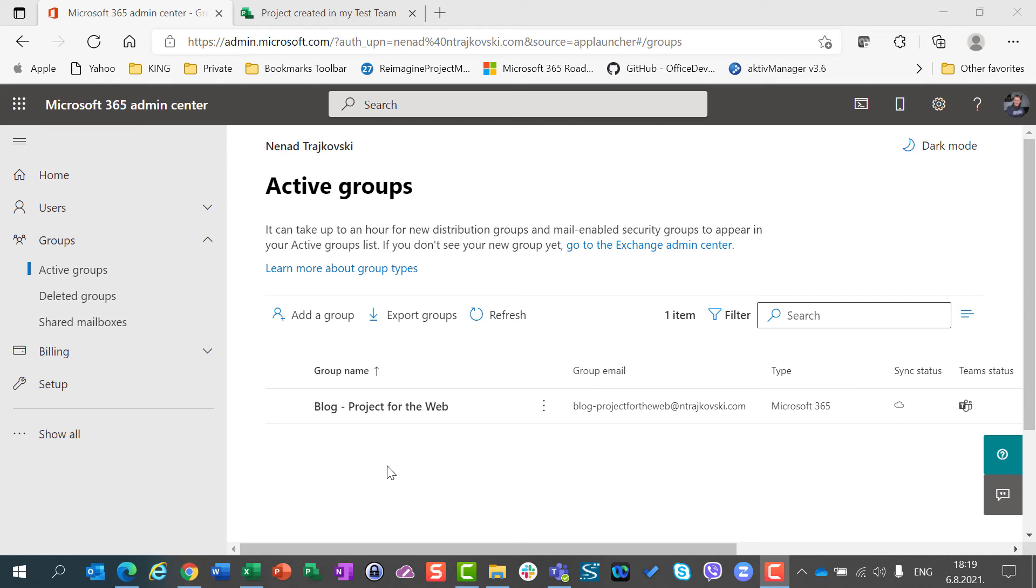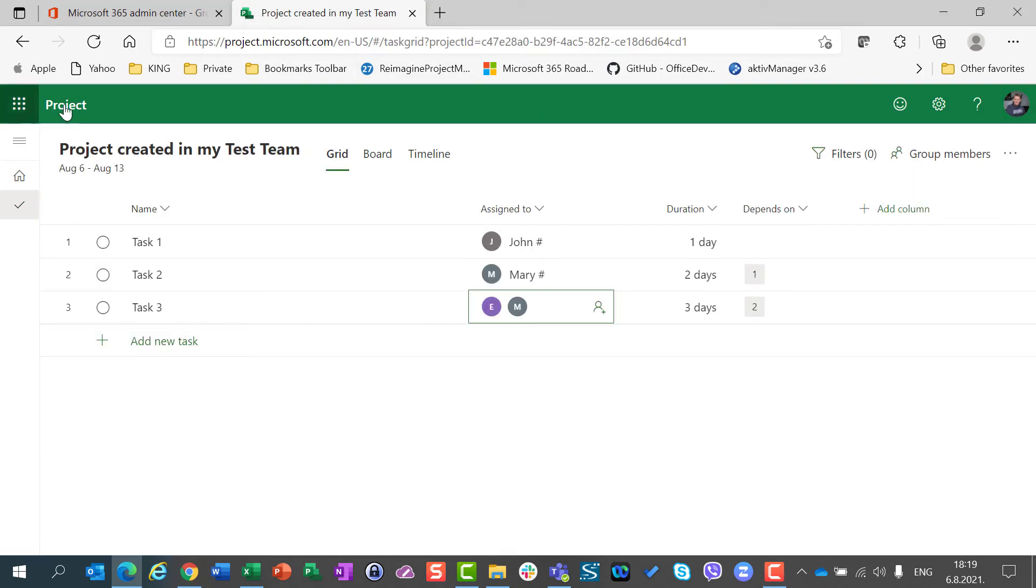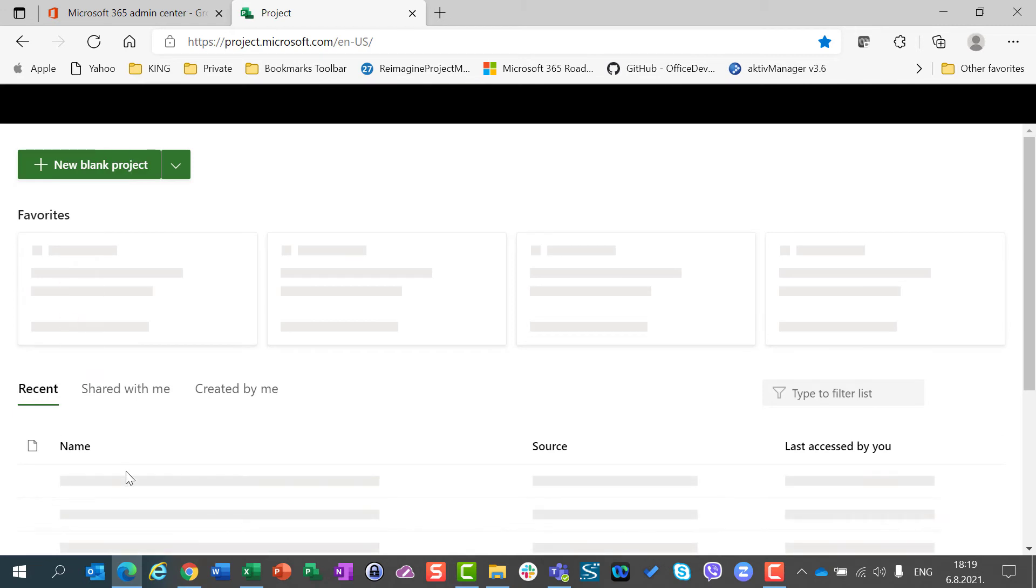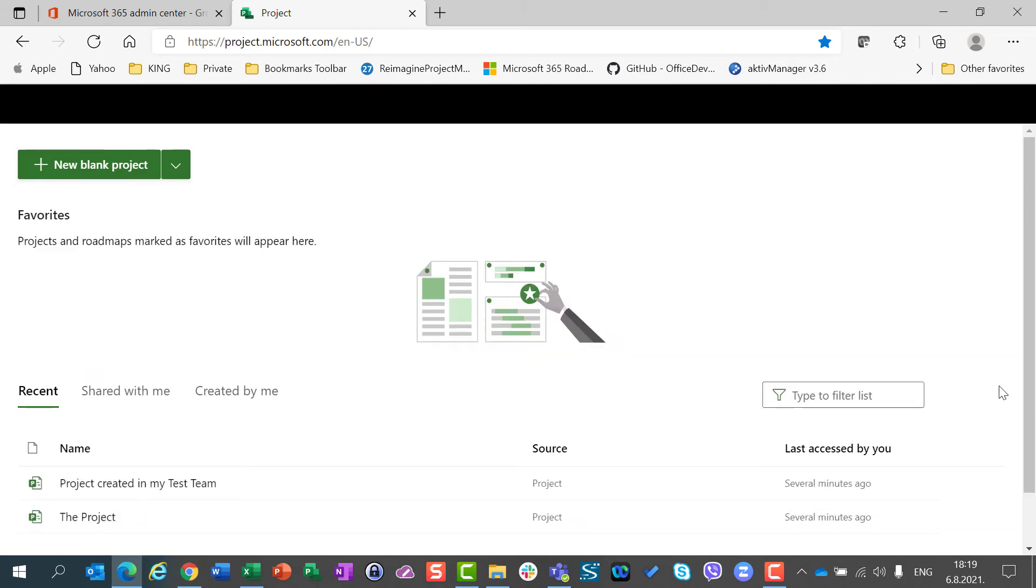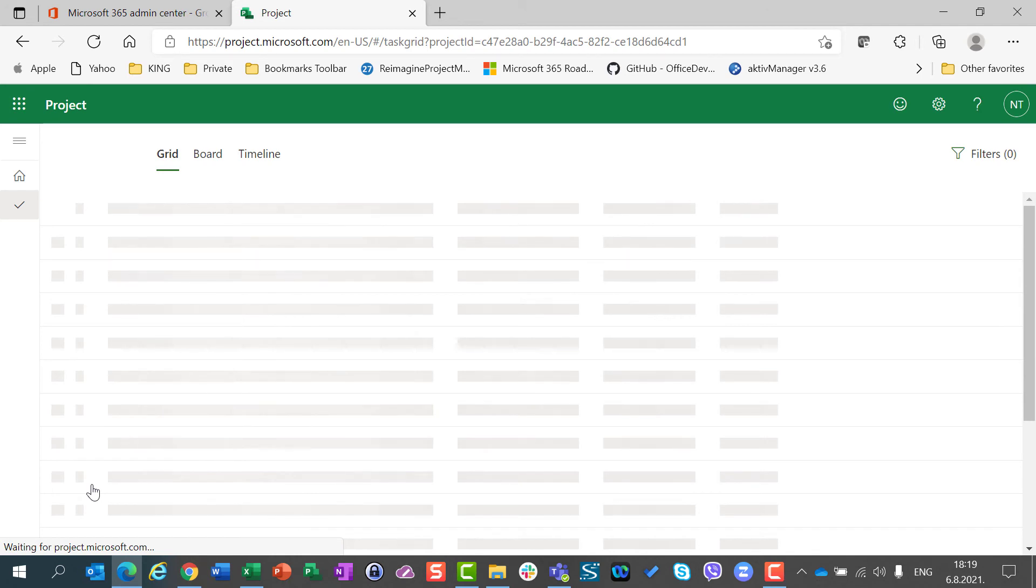You can see in my admin center that the group doesn't exist anymore. And let's go back to projects, all my projects, and I can go here to my project, which still exists.